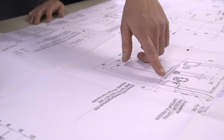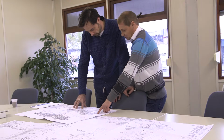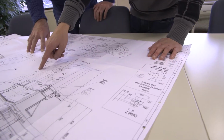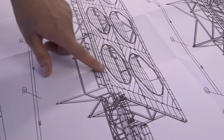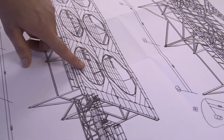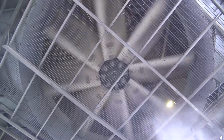To ensure that system downtime was kept to a minimum, everything had to run strictly according to schedule, which is why Siemens appointed a project engineer who could coordinate the whole process with a state-of-the-art project management process from start to finish. SLECO took care of the detail engineering itself, and permanent contractors managed the effective implementation of the project. Thanks to this approach, we managed to get the system back on stream within the predetermined time and without significant problems.